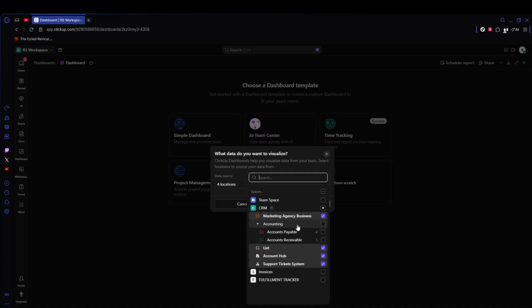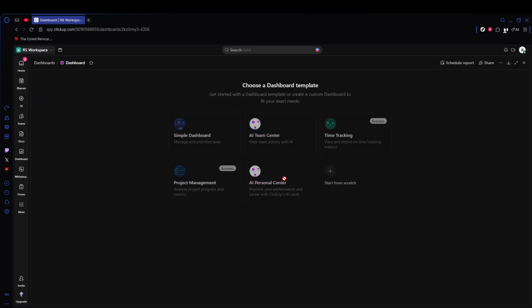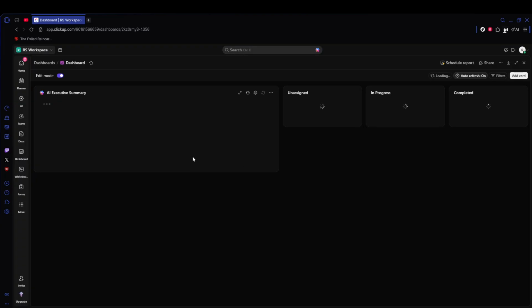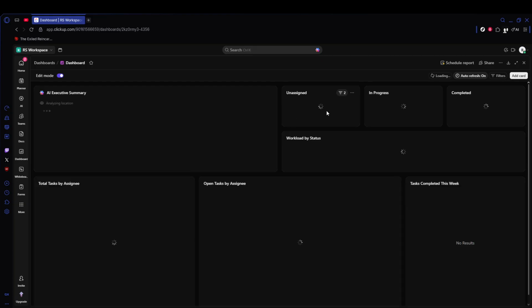Keep the system updated by regularly entering new invoices and payments and refreshing the budget and spent fields. Do a monthly review to compare actual spending versus budget and adjust categories or budgets as needed.